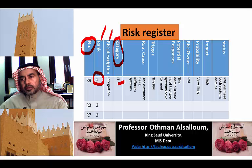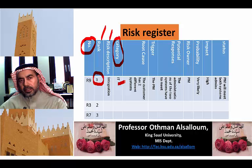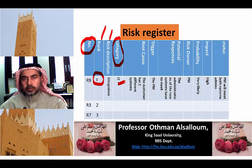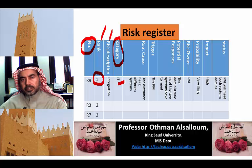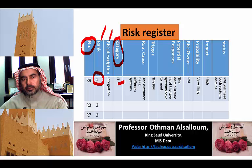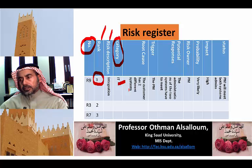The root cause for this potential risk is that the organization, with this project, has two previous systems. So this new project might not coincide or work well with the previous systems.